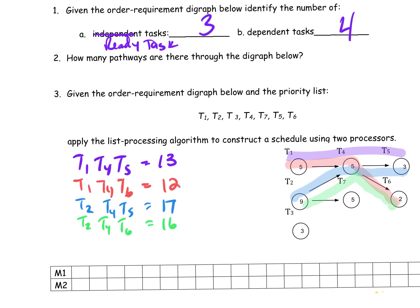I've got one more here — one that goes from Task 2 to Task 7. That's another path, and that's 9 plus 5, which is just 14. And you've got to remember this truly independent task is its own path onto itself, and that's just Task 3. So how many paths do I have here? I have six. I've listed them all, and I know there are six pathways through this diagraph.